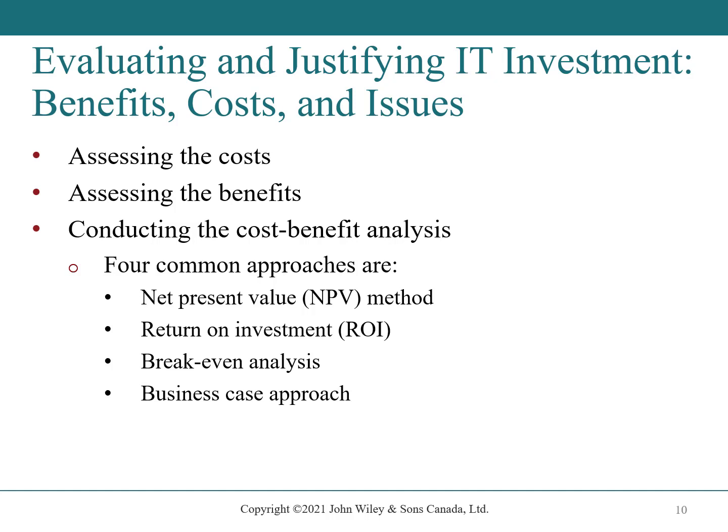What that means is that we are taking the stream of cash flows in the future and expressing it in today's dollars. They can compare the present value of the future benefits with the cost required to achieve those benefits to determine whether the benefits exceed costs.